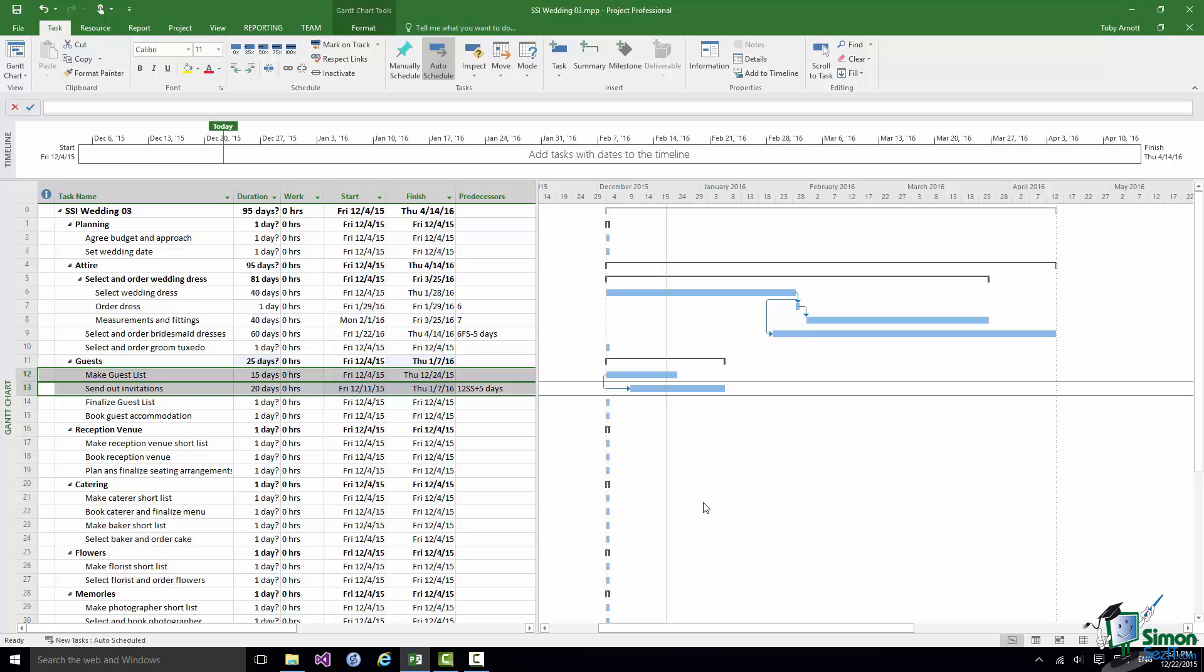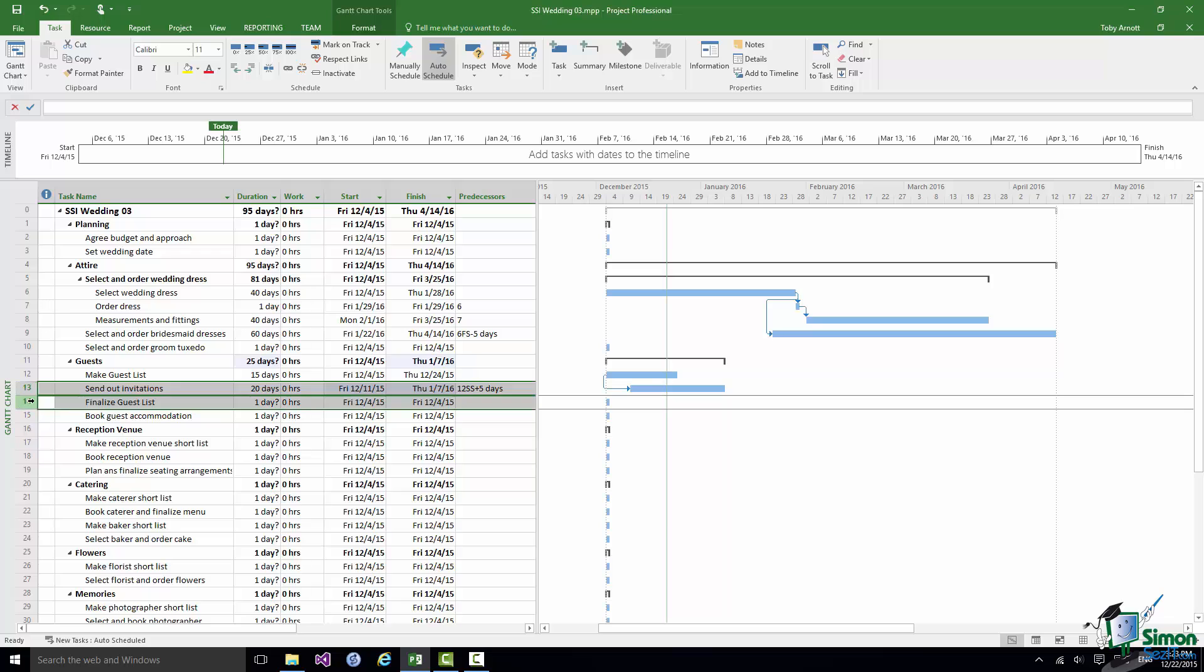But in reality you can't really finalize the Guest List until you've received all of the responses to the invitations. So what I'm going to do is to create a link between Send Out Invitations and Finalize Guest List that works on the principle that you need to allow say three weeks from the end of sending out the invitations before you can actually finalize the guest list.